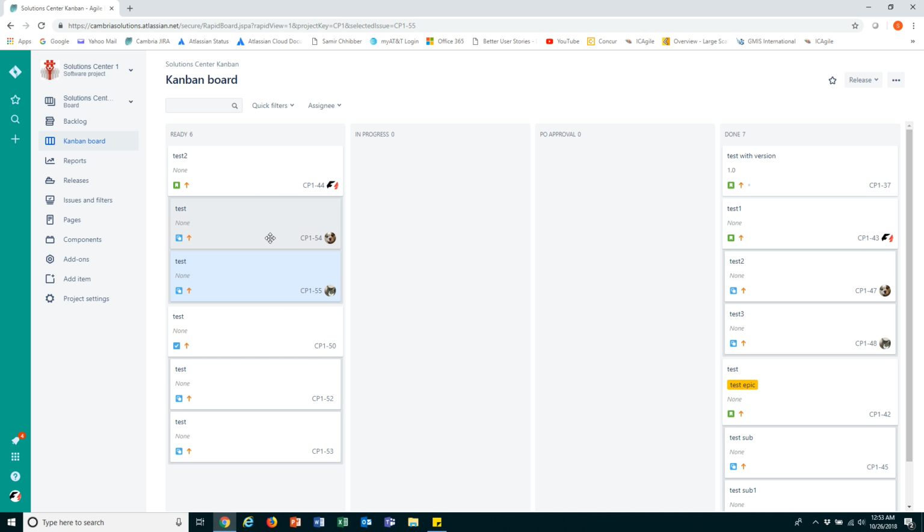If I have 5 people helping me with this particular story, then I'm going to have 5 different subtasks. I'm going to have a subtask for each person, and that's how we handle multiple assignees to a single story. I am still the person responsible for the parent story, but I'm indicating the individual pieces that the people that are helping me own. So that's how we handle multiple assignees.